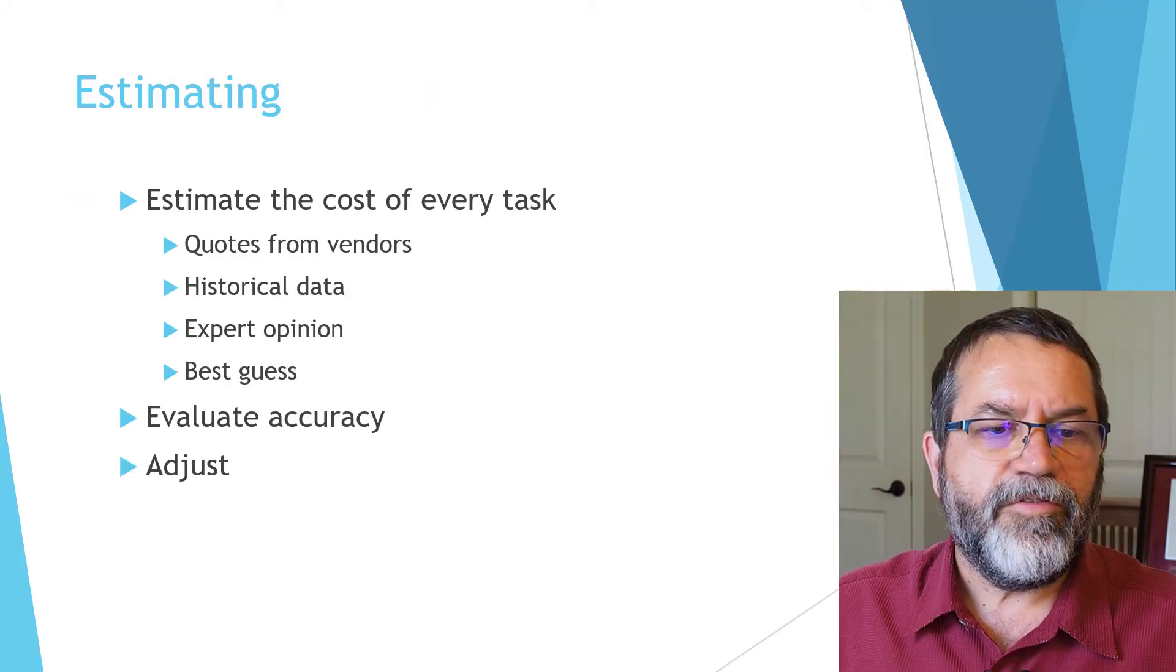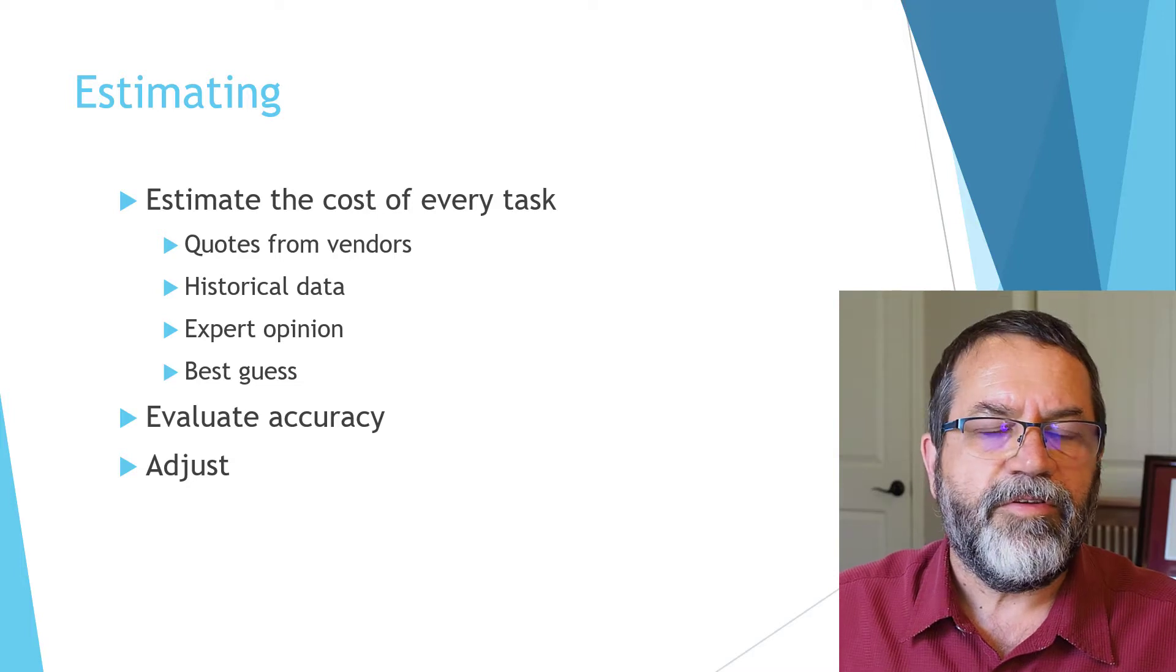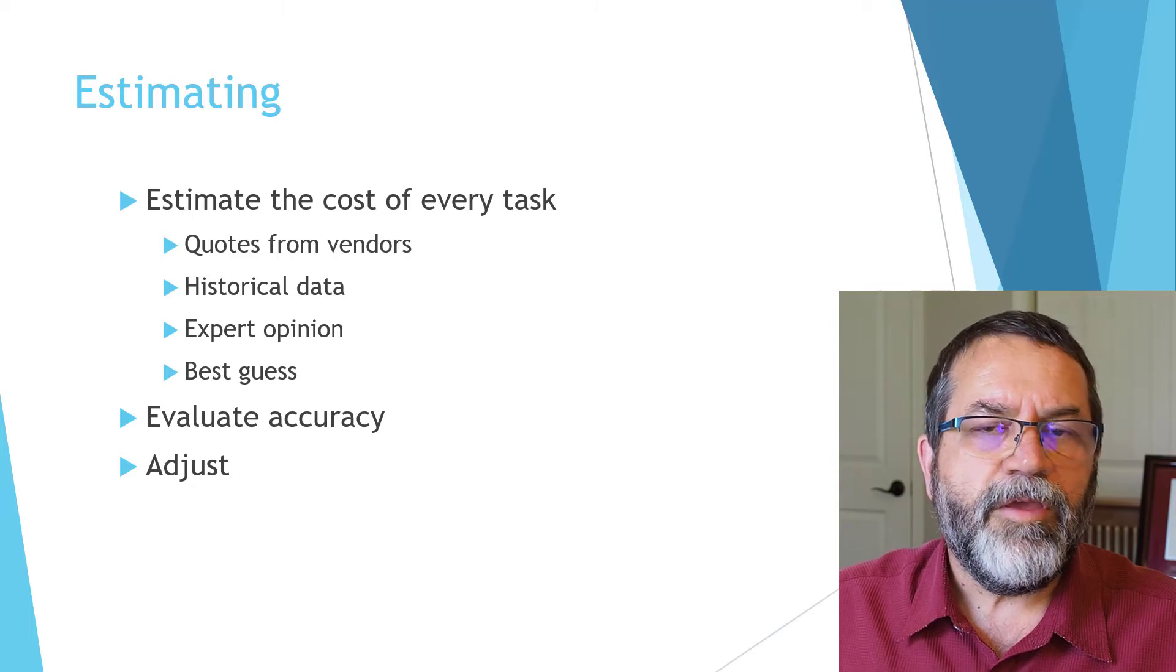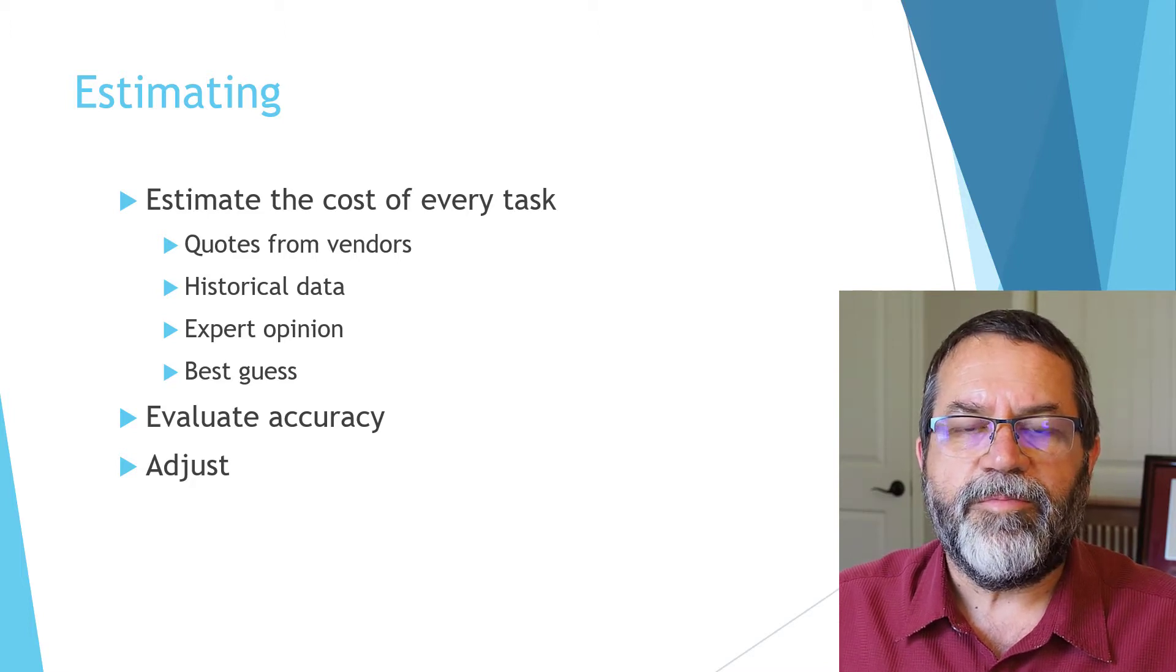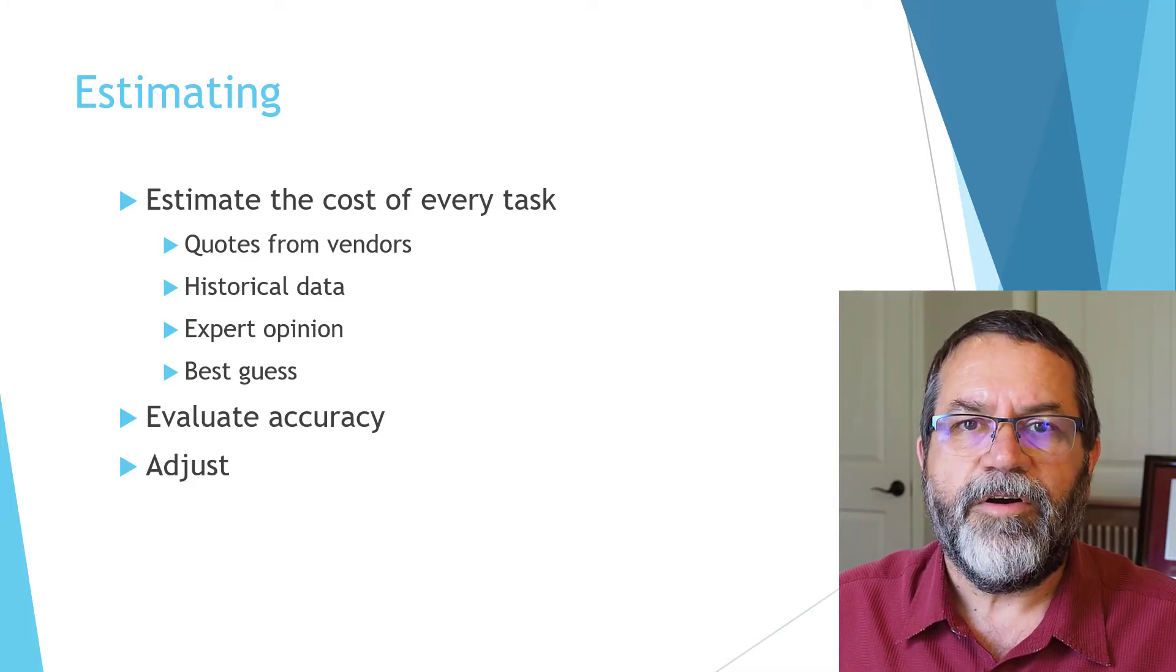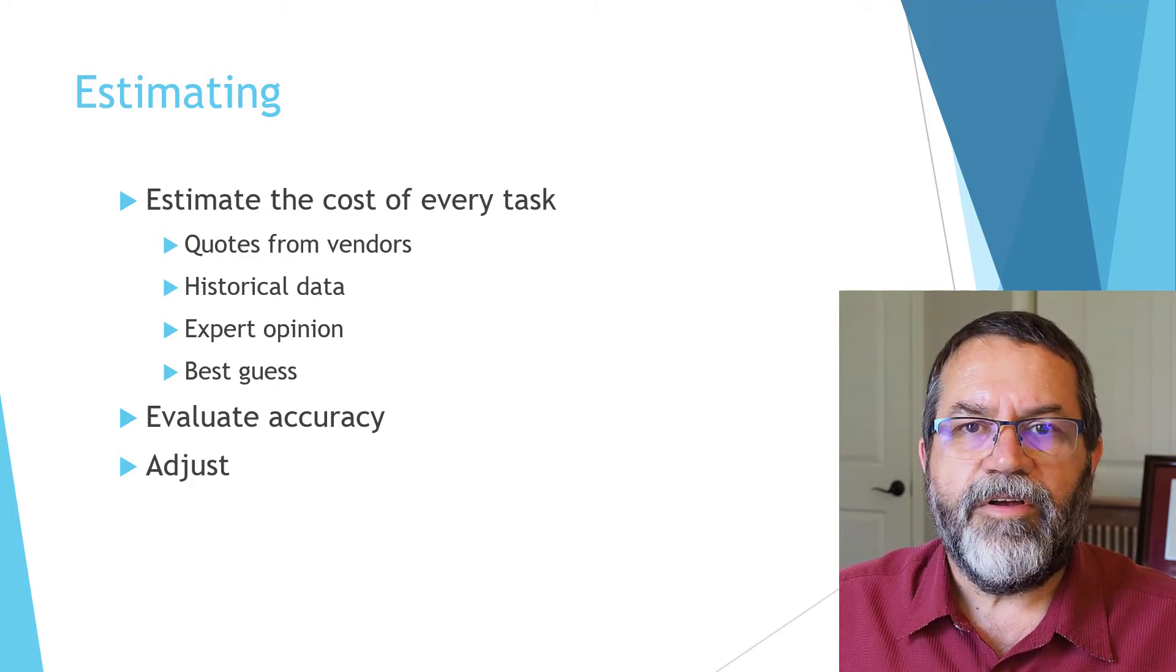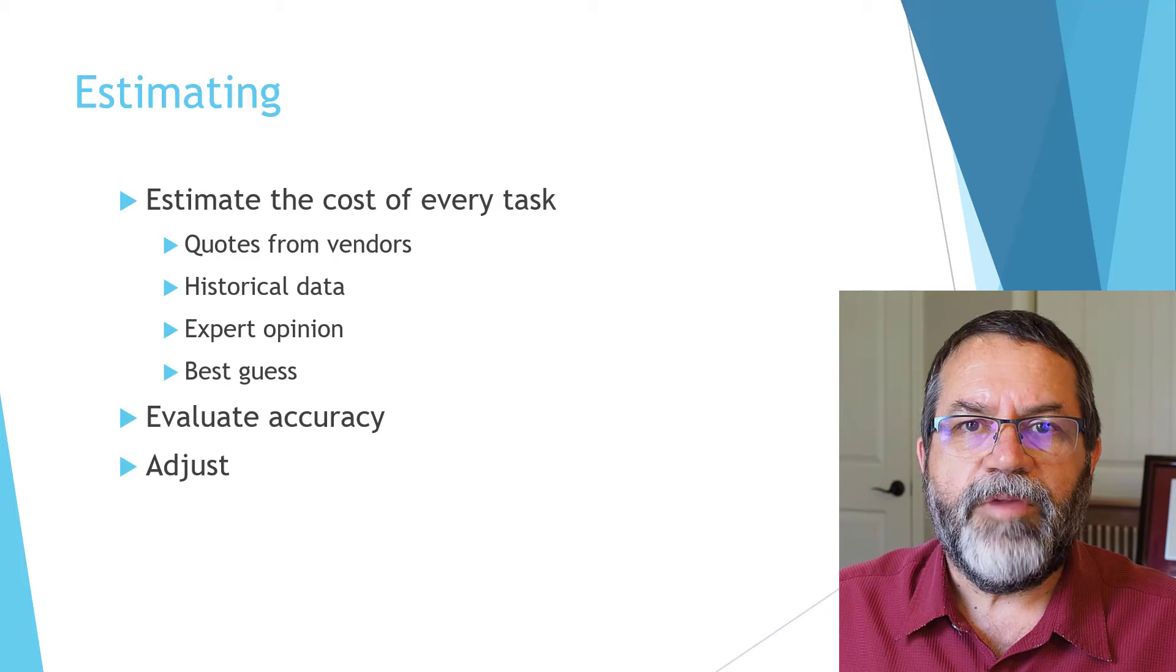For estimating, there's three basic steps. First, you estimate the cost of every task in your work breakdown structure. You can do that by getting quotes from vendors, using historical data, relying on expert opinion, or giving it your best guess. Then you have to evaluate how accurate you feel your estimate is, and based on that, sometimes you need to make some adjustments.